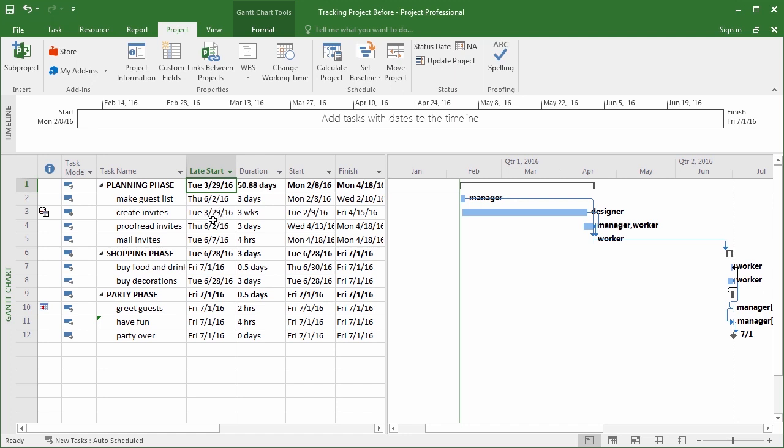So we all know that if we start a project the latest we can possibly start it, something's going to go wrong. So instead of starting on March 29th, let's back up the start date a couple of days, or maybe even a couple of weeks. Now it's important to see that we're padding the project by starting it earlier than we need to, instead of by making up padded times for our individual tasks. That way later, when we analyze how long things really took, we'll get a good idea of how long things actually really take and at how good our resources are at estimating durations.